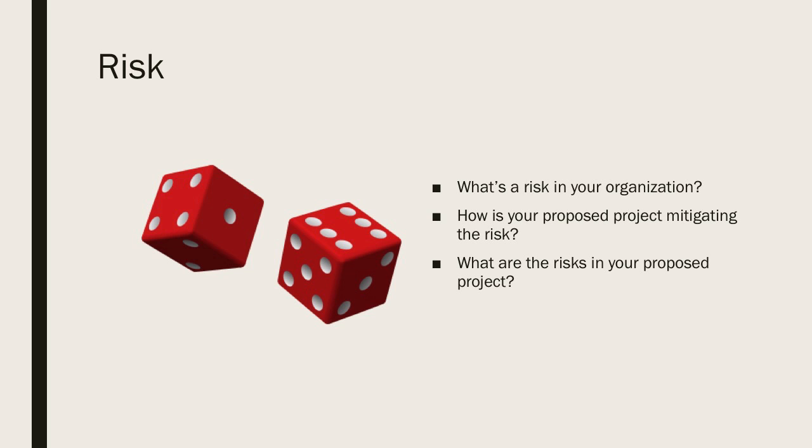You need to, from a high level, and we'll get into monetary in a second, say, okay, there's a risk that we might go down. I'm going to spend $100,000 to mitigate this risk. What was the value of that risk? If the vSphere cluster goes down and the organization doesn't lose any money, spending $100,000 to mitigate that risk really isn't a wise investment of money. You'll probably get your hand slapped and they'll say, great suggestion, but no, we'll accept that risk. If we're talking about a transactional system, an ERP system, some mission critical piece of hardware or application, something that keeps track of someone's vitals in a hospital, then $100,000 is a drop in the bucket to protect the company against that risk, and may be a no-brainer to get approved.